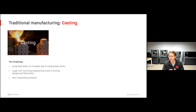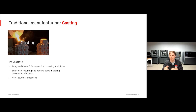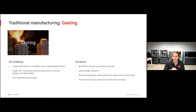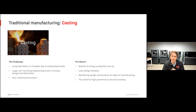When you're actually doing the casting process, it's generally a relatively industrial process. For most engineers and manufacturers, casting is not something you're going to be doing in-house yourself. If you're a designer, there's often quite a bit of distance between where you're doing the actual casting and where the parts are being designed, which leads to some logistical challenges. As a result, you're seeing months to bring up a production line from the day the design is approved to parts actually being produced, and you're seeing much less design iteration because once a design is finalized, you really can't make any changes to that casting without restarting those long lead times associated with tooling.